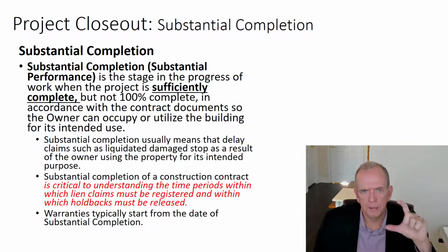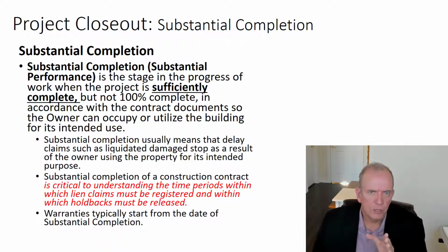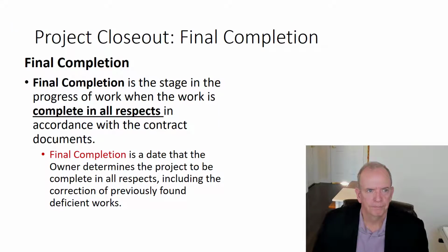The definition of substantial completion gets a little bit more complicated, but it really is a trigger with schedules as well. It ensures that if you hit substantial completion, that generally is a trigger point that says you're no longer responsible for liquidated damages. I say generally, there are always these minute exceptions, but it's a good target, and you want to have that as a line item in your schedule that, boom, we hit it on this date.